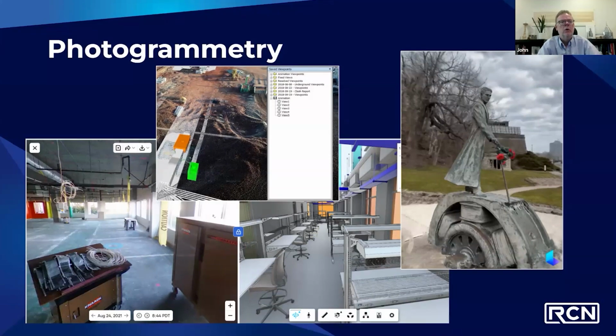By taking the BIM model and overlaying that into the drone imagery, we could see where that data was being laid. They also started to use that for their pay apps. So how much piping had actually been installed, and then they could take the BIM model and do some rough calculations off that and understand exactly how that occurred.